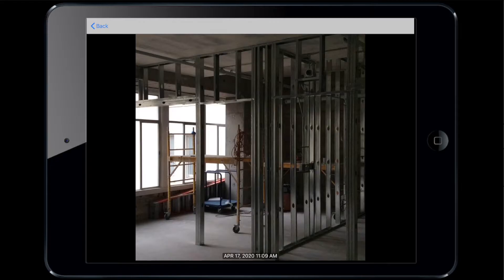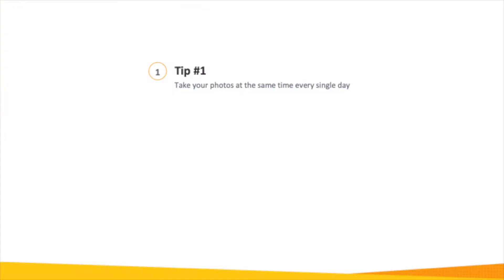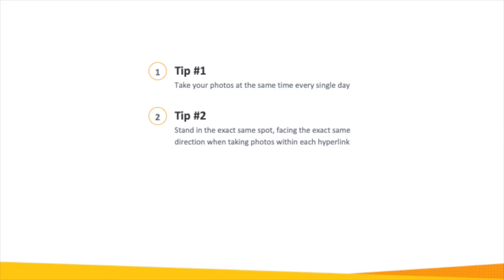Here are some tips and tricks. Tip number one: with your team, decide what time of day you'll want to take your progress photos. I suggest doing it first thing in the morning or in the afternoon before you head home for the day. Taking the photos at the same time every day will ensure that your updates are consistent and that your team knows when to expect them. Tip number two: depending on your project, I suggest having one pin for each direction within each room. Your photos should all be taken from the exact same view so you can clearly see which area is being shown and the exact progress that has been made.